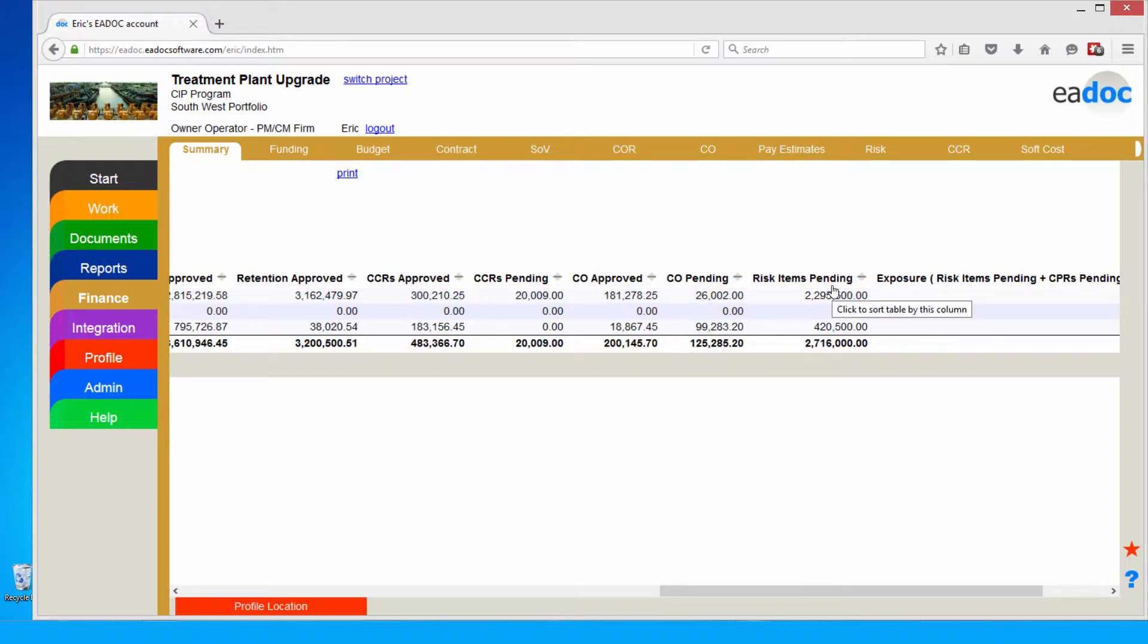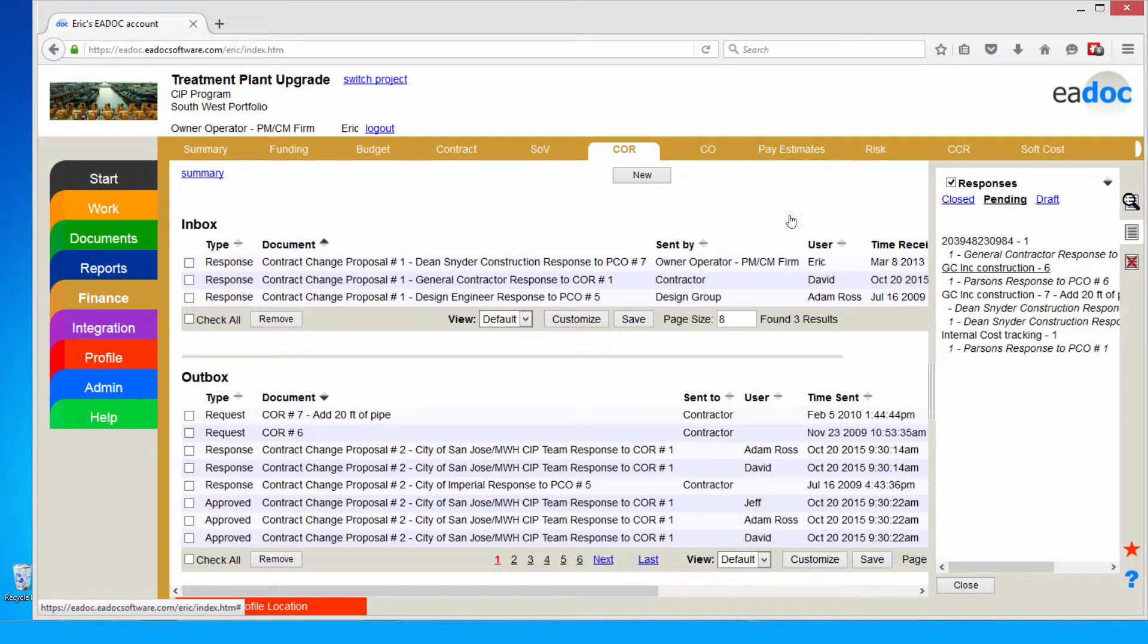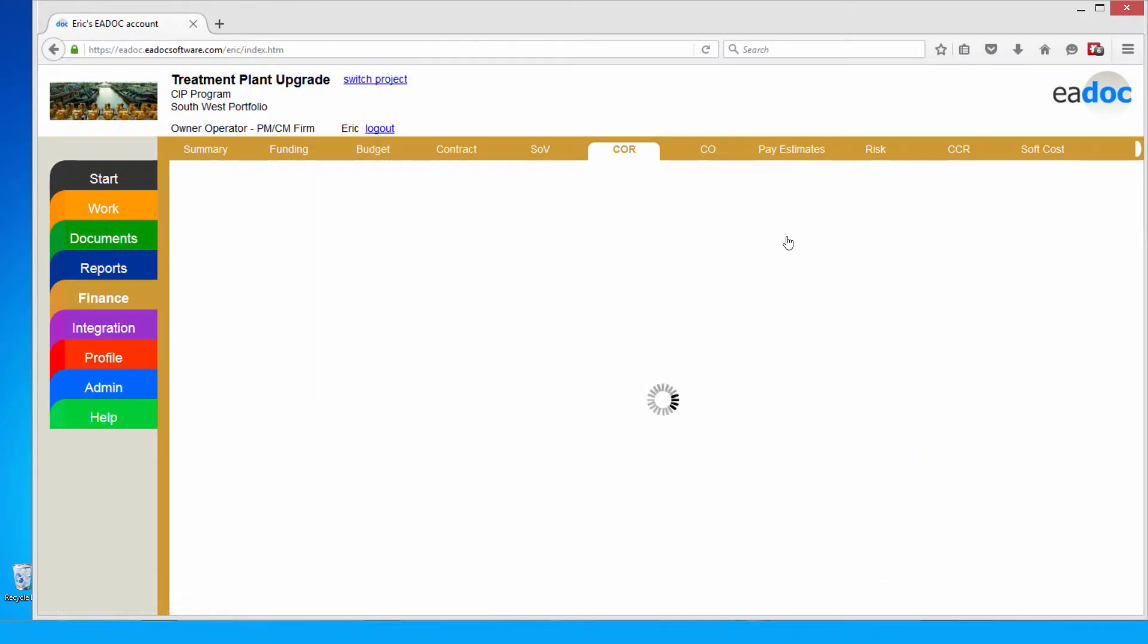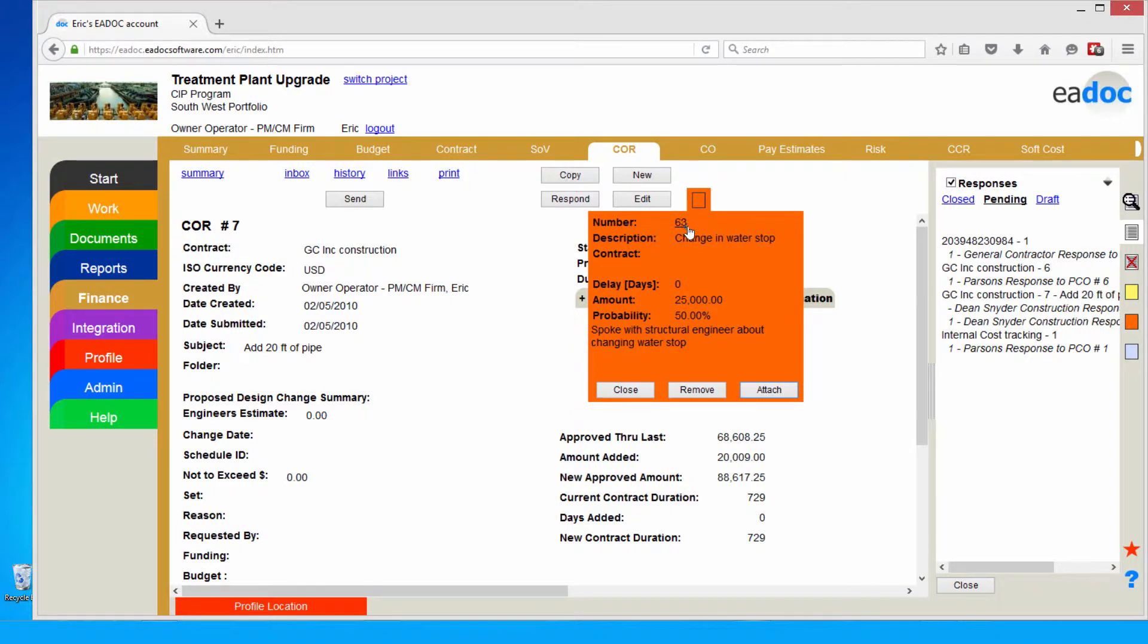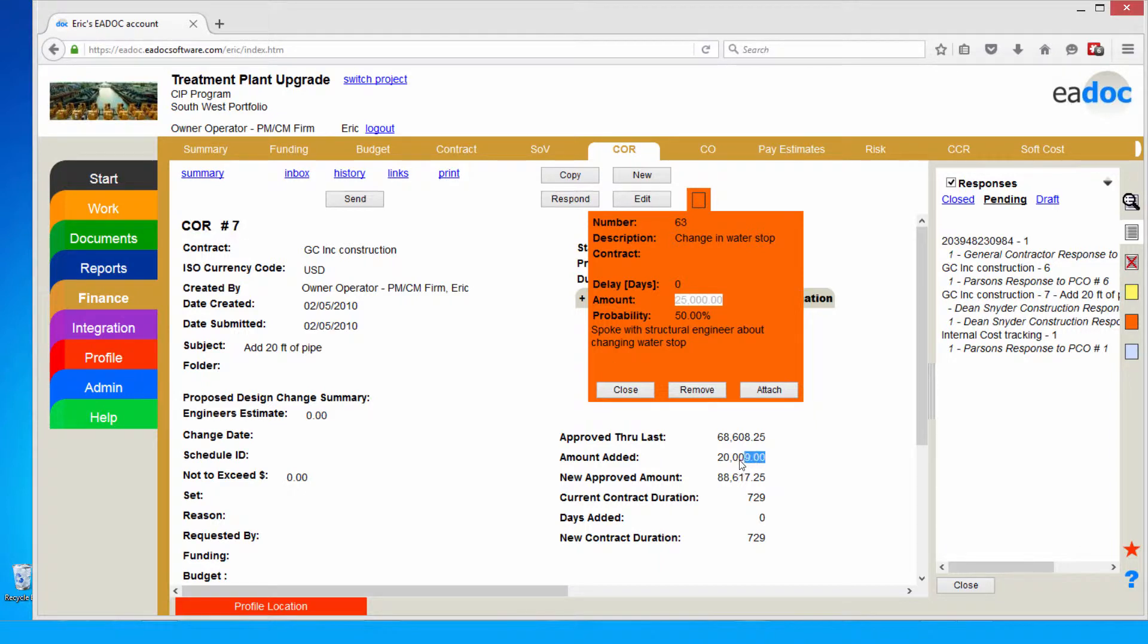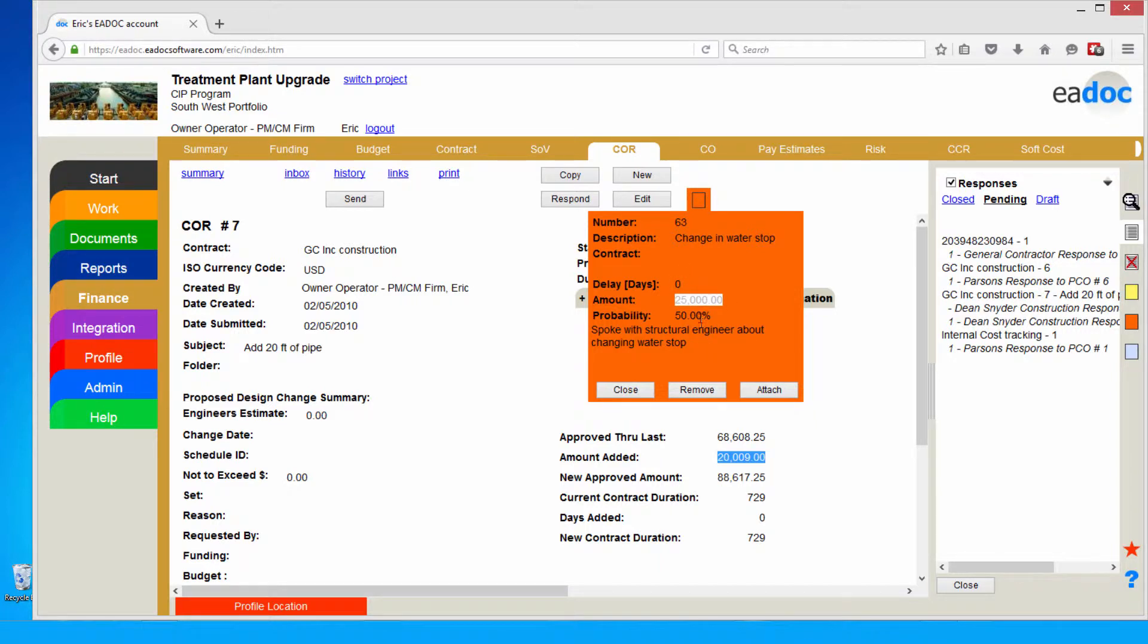With these risk items, typically you're going to have one of two outcomes. Either you're going to mitigate that risk and close it out, or it's going to turn into a cost impact in the form of a change on the project. Within our capital project management system, I can actually track the changes here in the application. I can bring up a change request and the risk item that it's related to as well. I can see here I've linked my risk item number 63 to change order request number 7. By being able to link the risk or the issue item that I was tracking, it gives me the ability to identify what the forecast was against the outcome. This one I was forecasting at a $25,000 cost impact. My outcome ended up being a $20,000 one. This is good. I was a little bit conservative with my risk forecast. If it was the other way around where I had a $25,000 forecast and it ended up being a $200,000 change, that's a big bust. Without the ability to identify those relationships, it's tough for my team to learn. I want to make sure that the information I'm capturing is going to allow my users to better forecast risk and understand what happened. I want to understand the outcome of the risk as well. How do I go from this forecast to the change on the project?